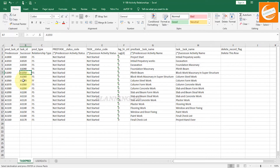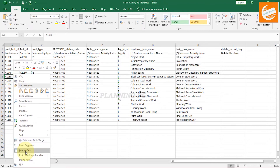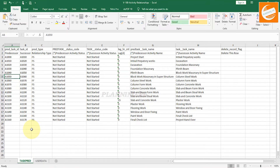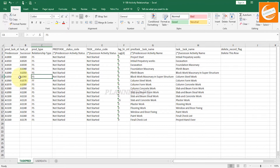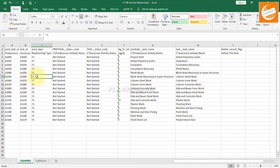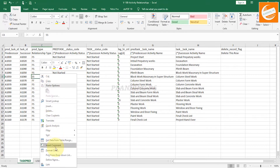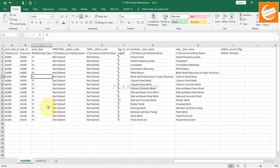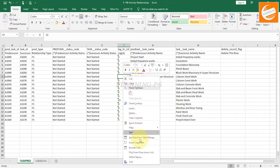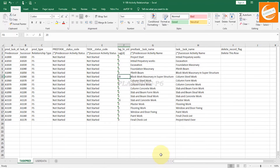We will change the predecessor of one activity. Copy the new predecessor value using Ctrl+C, then paste special as Values. Right-click and format the cell as Text — don't forget to format the cells as Text, otherwise it will not work in Primavera. We have changed the predecessor and will also change the relationship type to Start-to-Start. Format that cell as Text as well. Then add a lag of 20 days, and format that lag cell as Text too.